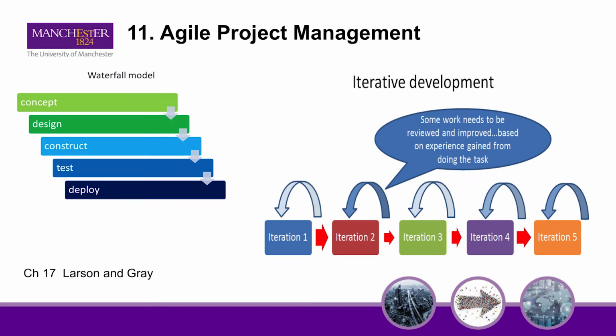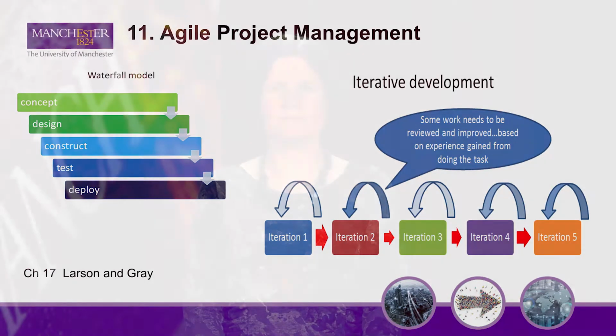These traditional planning and control methods work well if the scope is well defined, the project technology established, and the market conditions predictable. However, if a project is based on brand new technology or is attempting something very new and different, then there is little prior experience to draw upon to inform a detailed plan. In these circumstances, Agile project management methods might be more applicable.